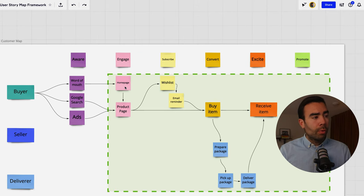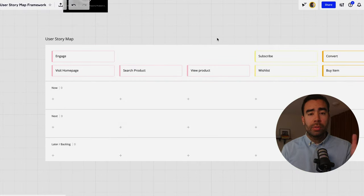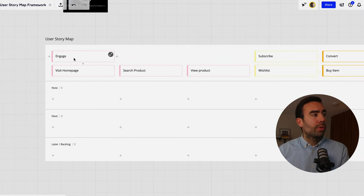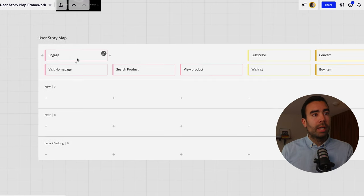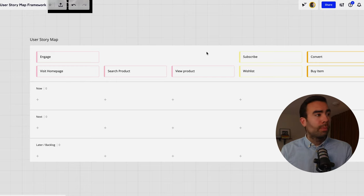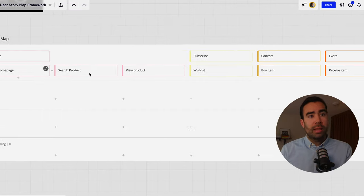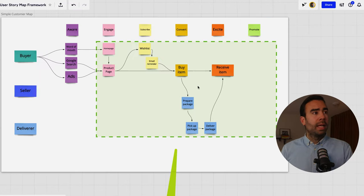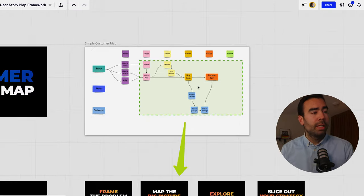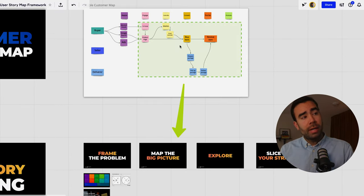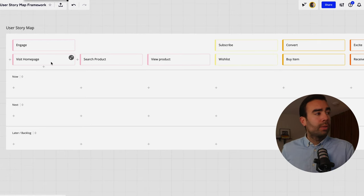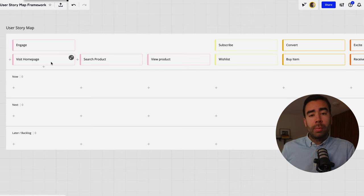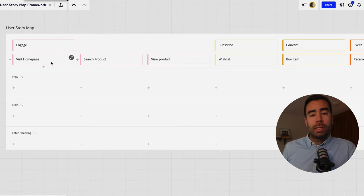We already had more concrete examples under it you can put those things at the top of your user story map these are activities in this case we have chosen for engage subscribe convert can also be something else if that works better for your product and then below it we have specific tasks that the user is going to take to get to the end result in this case it's really easy because we already created the customer journey. If you don't have a customer journey yet then either you can create one or you can start the use story map with writing down the steps a user takes to get from just learning about your product about you to becoming a raving fan at the end what are the steps in between and put them in a chronological order.